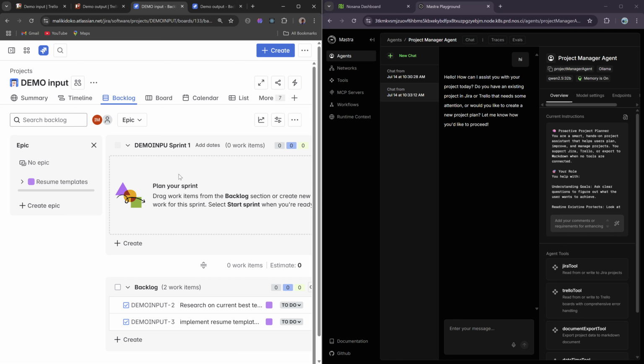Now, Jira is a bit different, right? Because it has certain things that you have to add. We have sprints that register a particular effort, a particular thing you are about to do in a particular time. So let's say we want to work on this for the next 1 month. We add that to a particular sprint and give that sprint a date range.